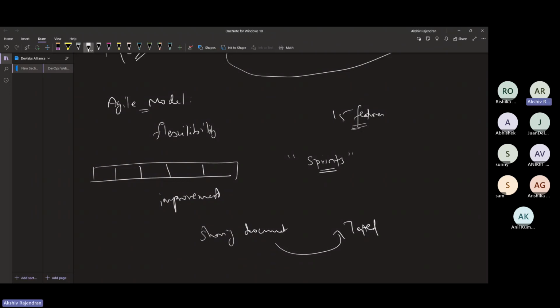By doing this simultaneously, as soon as one member completes the code, it moves to the testing phase. This helps me reduce my time. I'm not going to wait for all 15 features to be completed. One job over, just give it to me, I'll test it, I'll approve whether it's working or not. Again, this seems perfectly fine for our application.